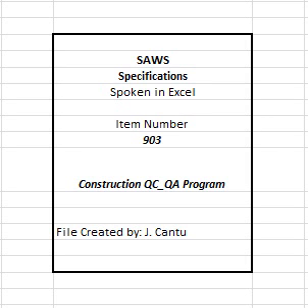1. Require the contractor to remove and replace deficient materials and/or workmanship. 2. Withhold payment. 3. Require removal of unqualified personnel. 4. Stop work until deficiencies are corrected. 5. Default the contract. 6. Enforce liquidated damages. 7. Disqualification from bidding on future SAWS projects. Such drastic actions are not desirable and would be necessary only when all other amenable avenues of partnering have failed.